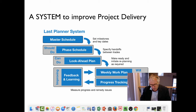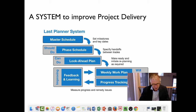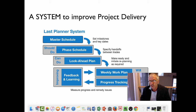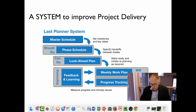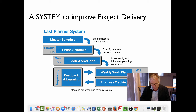The master schedule process is used to determine the likely duration of the project and to set milestones and phase plans needed to deliver the project to an estimated target completion date. At this stage, the team will look ahead at long lead times and deal with any design or construction constraints that affect the feasibility of delivering the project.